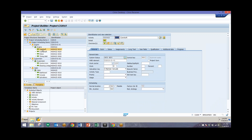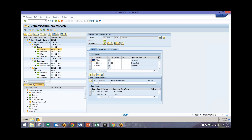Beginning with this camshaft activity, we can take a look at our different relationships. We can see that there are three different relationships regarding this particular activity. We have a finish-start relationship with the second activity, meaning that once this camshaft activity is finished, we want to start this crankshaft activity, since that's the second one in the network.